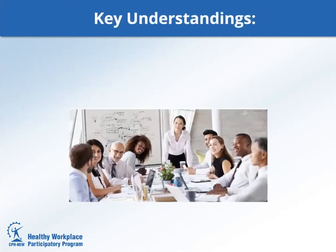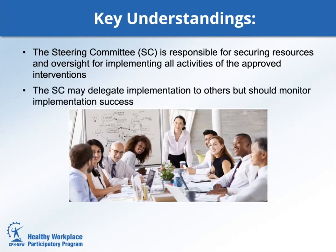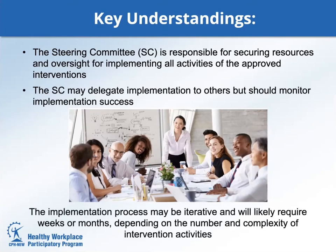Before we start, you need to understand that successfully implementing an intervention takes careful planning and management, especially if there are multiple intervention component activities. You'll need to involve the right people, gather input, overcome roadblocks, and track progress. The steering committee is responsible for securing resources and oversight for implementing all approved intervention activities. The steering committee may delegate implementation to others but should monitor implementation success. The implementation process may be iterative and will likely require weeks or months, depending on the number and complexity of the intervention activities.